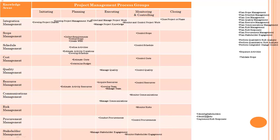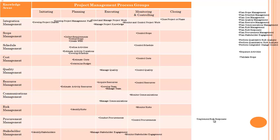Identify stakeholder — it will come under process group initiating and knowledge area stakeholder management. Identify risk will come under planning process group and knowledge area risk management. Implement risk response — implement means some actions are being taken place, so it will come under executing process group.